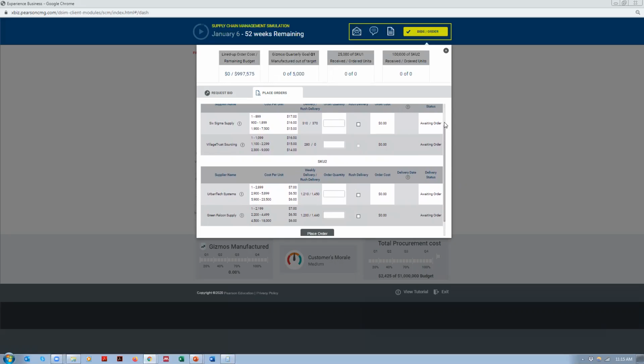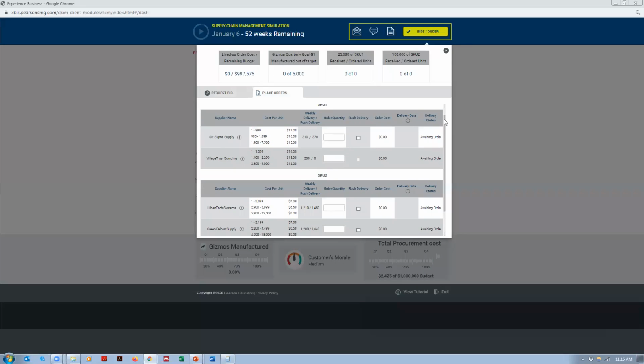Now, so what exactly is the first supplier saying? So basically we have this first supplier, which is 6 Sigma Supply. This supplier says that I will charge you $17 if you place an order of 900 or less. If the order quantity goes up, my cost goes down. And the lowest cost of $15 is when you place an order of between 1900 to 7500. The weekly capacity of this supplier is 310. But if you ask for a rush delivery, it can deliver 370 per week.